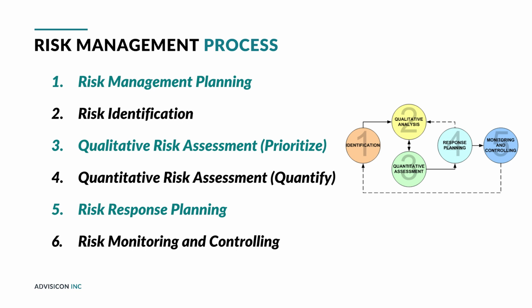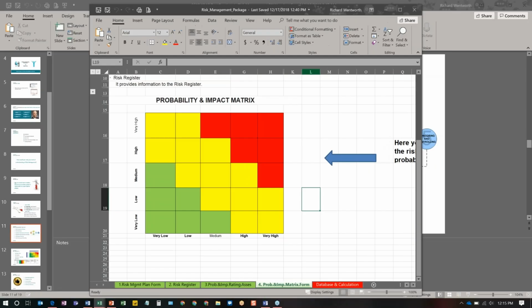Okay, qualitative risk assessment, so prioritizing. We go through, and again, we define the risk in terms of severity and impact. We use it as a means to prioritize the risk. The tools that are useful here are risk matrices or risk breakdown structures. So this would be a risk matrix, which talks about the probability and impact as you see. Other people call these heat maps. This allows you to see, by mapping your risks, which are low, medium, high, or critical. So useful to have these.